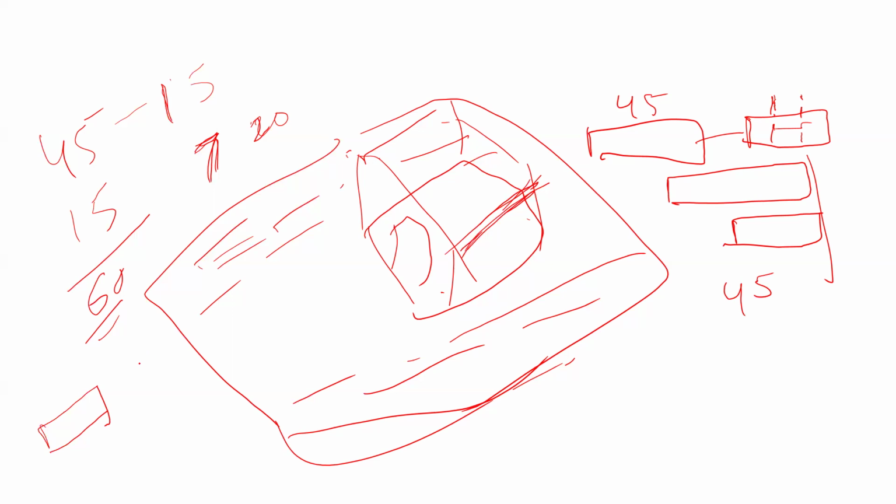Now, in the planning, here is the slab and here is the tile. There is a 21 days gap here. This 21 days gap is called lag. It's a lag. You need to keep a lag between these two activities. It's an intentional gap between two tasks. That's called a lag. Are you getting this, friends?